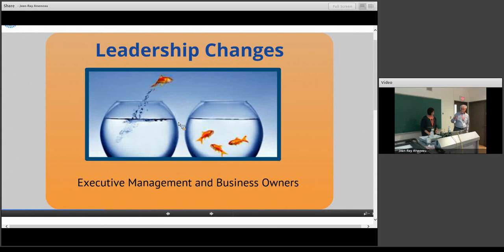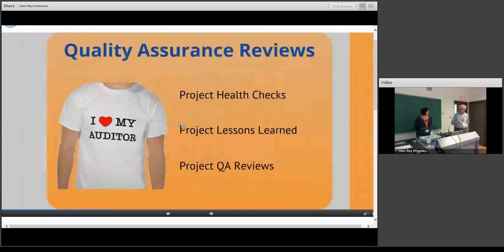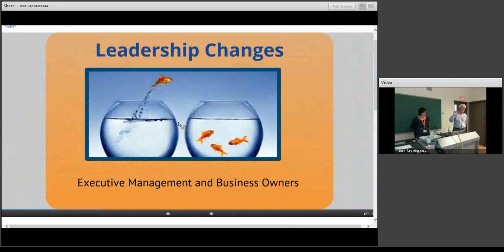I just want to add, on the leadership change, that the change was often with our business owners, the decision makers. So a lot of the project decisions that we had to base work on were being questioned, sometimes changed. That increased the complexity of the project work itself. And Debbie, as project manager, did an excellent job working with the new leadership and her project team to maintain the focus on the end goal, what we were trying to accomplish. It was a very difficult time, but the leadership changes were one factor in our need for a very formal project readiness assessment.